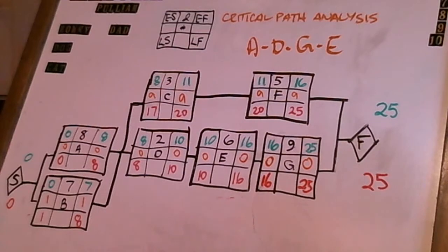Okay? So then what is critical? Well, critical is going to be those activities that have 0 float. So in essence, your critical path is going to be the string of activities in your network diagram that have 0 float. That is essentially saying that your late finish less your early finish is 0, that your late start less your early start for that activity is 0. There is no room to play. There is no float. There is no slack in those activities. Thus, that makes them critical.